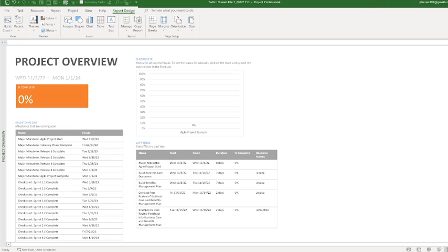And then we got late tasks. So as you see, this is showing you these tasks are past due, and that's because we made that shift of the start date or the start of the project to a later time versus what we baseline, which originally was September, now it's November. So that gives you a little perspective there.